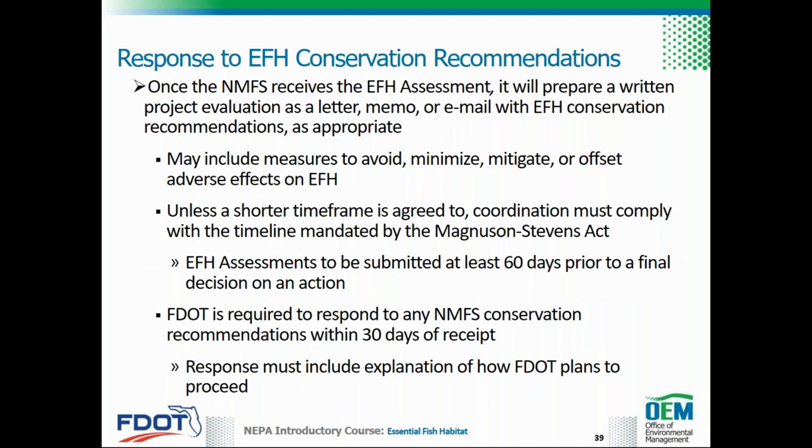Once NMFS receives the EFH assessment, it will prepare a written project evaluation as a letter, memo, or email. This evaluation may include non-binding EFH conservation recommendations and measures to avoid, minimize, or mitigate adverse effects on EFH. Unless a shorter timeframe is agreed to, coordination must comply with the timeline mandated by the Magnuson-Stevens Act, which requires EFH assessments to be submitted to NMFS at least 60 days prior to a final decision on an action. If NMFS provides conservation recommendations, FDOT is required to respond to them within 30 days of receipt, explaining how FDOT will proceed.